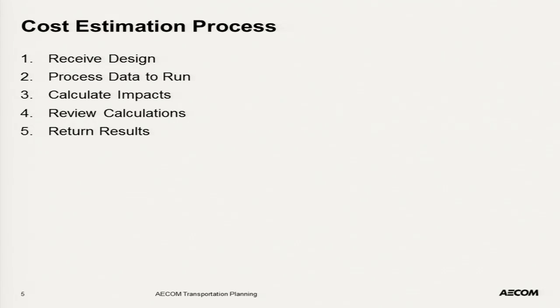We need to know whether it's a new or existing right-of-way. If you're building a new road, that's going to involve a different level of compensation than if you're just widening an existing one, because somebody maybe didn't realize or didn't know in advance that there was going to be a road going through their backyard. But if there was one there, they were kind of aware of that situation.